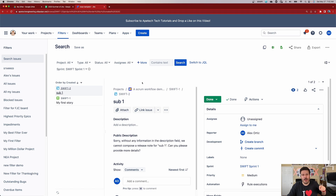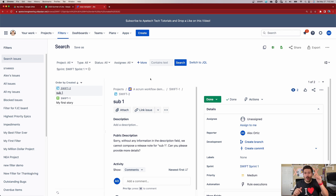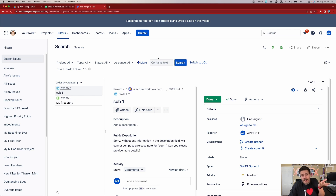Once you do that, all that it's done is gone out to Jira and found every issue that has this Sprint value. Now, this may be a little tricky if you have a lot of Sprint 11s, so you're going to want to click them one by one and figure out which one has the stories that are important to you, so that you can identify which is your actual Sprint. The best practice — if you haven't caught on by now — is to create unique Sprint names and it will save you a ton of headaches down the road. But if you don't have that luxury and you've created a Sprint 11, make sure you go Sprint by Sprint and find out which one actually has your issues. Under the hood, the ID is still going to be unique. Every time that you select an item from the dropdown, it's going to run a unique ID lookup on you. So if the IDs match, you're going to return the right stories and then you're going to be able to get your ID.